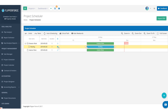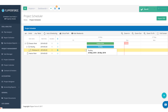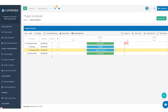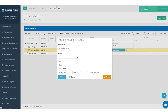Now let's add in windows and doors. Windows and doors have to happen after roofing is installed, so let's drag that over to the right. Generally, windows and doors might take about three to five days to install. If you've got 10 windows, a front exterior door, and a patio door, that could take about three to five days. Let's plug in three days here for all the windows.